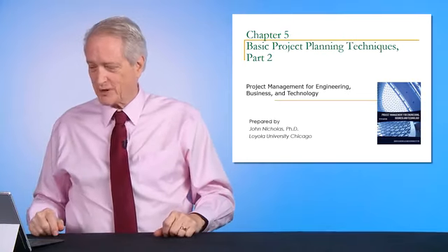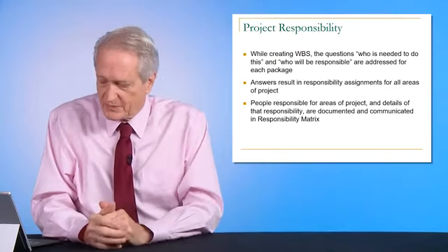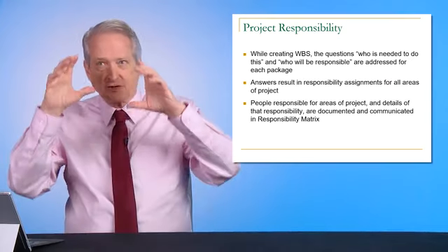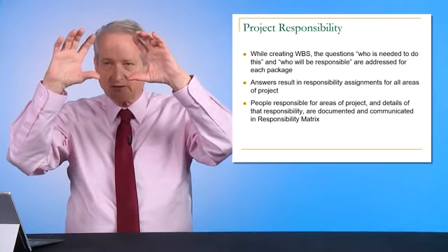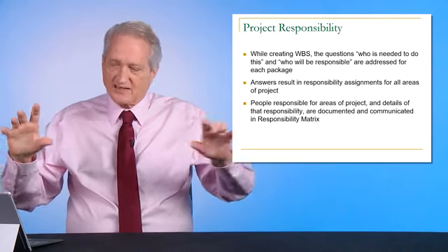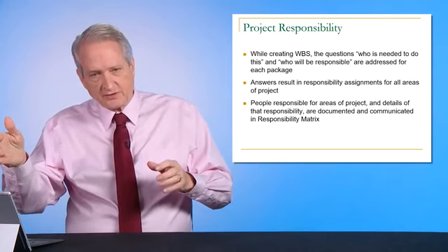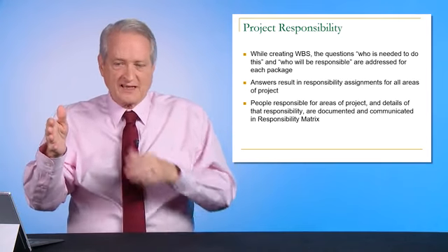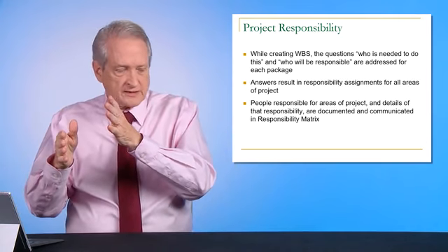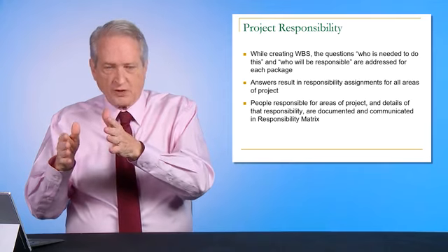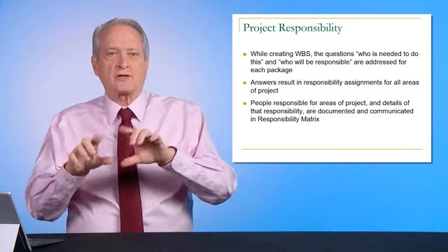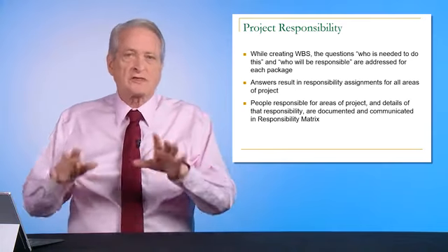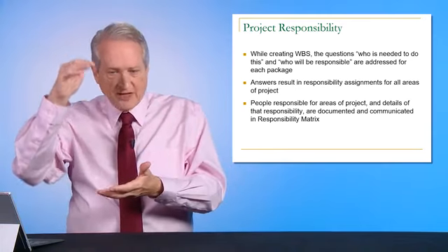Fun stuff. So what we're going to be doing, you typically create a work breakdown structure, and you're going to say, here's the project, and I'm going to break it into tasks. If I'm building a house, I'm going to have to do the foundation. I'm going to have to get approval for planning. I'm going to have to do the plumbing, rough-in plumbing, rough-in electrical, all these different things. And those would be divided into other sections. Add heating and cooling. Those are different sections. So you lay it out.